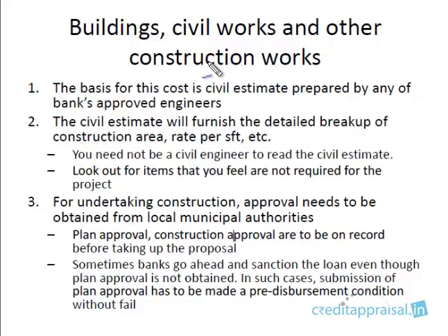This is a major component of the project cost. Some of the points that you need to keep in mind when dealing with civil works are: what is the basis for this cost? This is a civil estimate prepared by the bank's engineer. There will be a panel of approved engineers, and the company can get the civil estimate prepared by any one of the engineers on this approved panel.